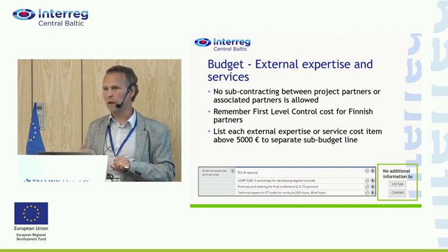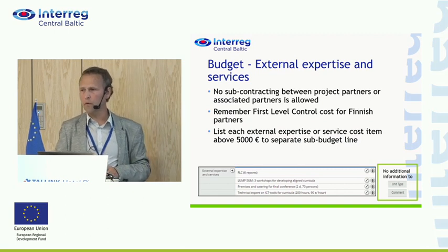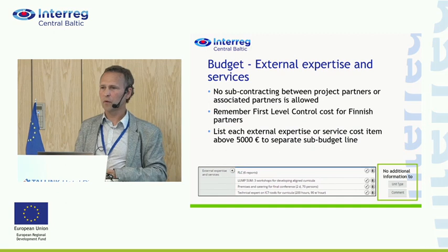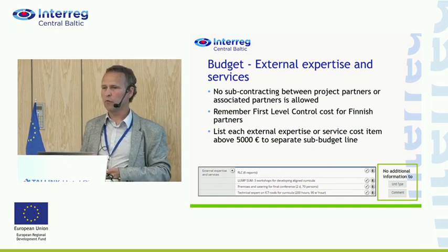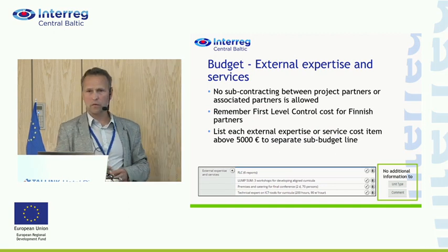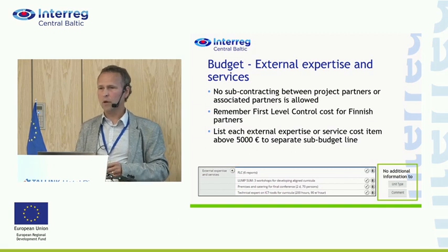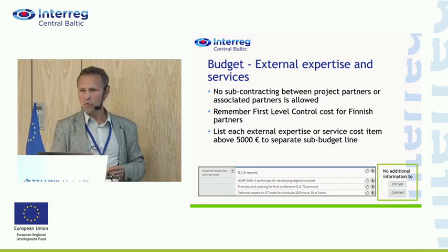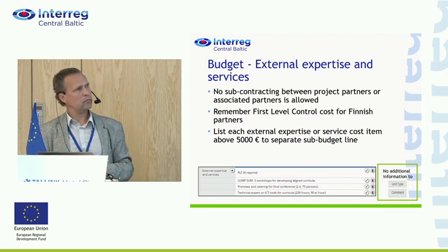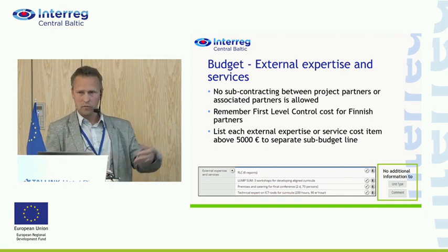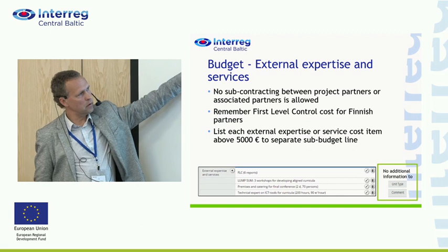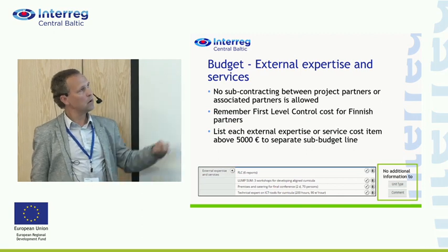In some cases there is a feeling that applicants try to involve all relevant organizations who may have some knowledge or some expertise on this topic, involve them as project partners. It's absolutely not needed. You can buy in services, buy in expertise, and that's the idea, how you keep your partnership smaller and also maybe find the better or more cost-effective service providers as well. So don't forget to plan Finnish FLC under this budget line.